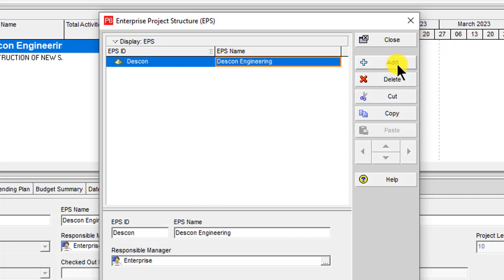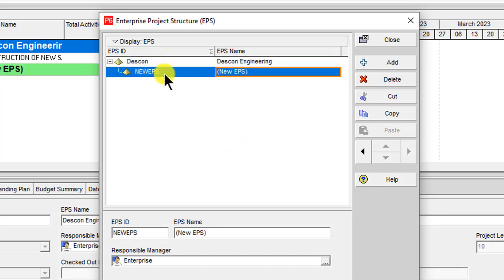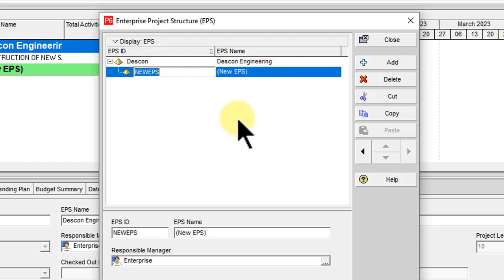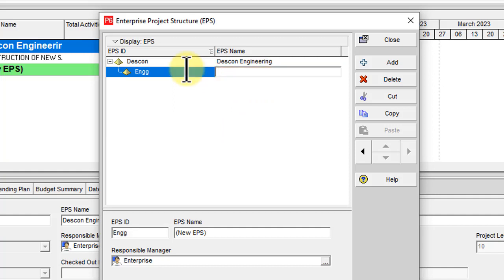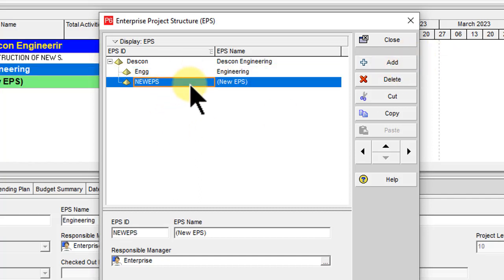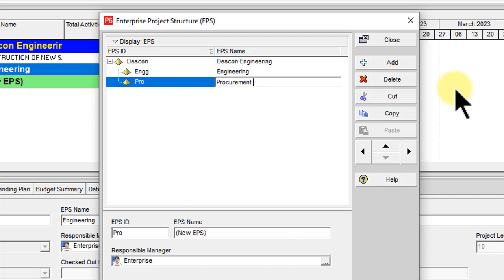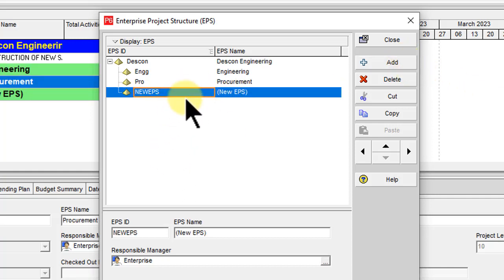Click the plus symbol button and click Add — you can see it becomes a sub-category of the company, Descon. Descon works in three major areas: Engineering, Procurement, and Construction. So let's add Engineering first, then Procurement, and last Construction.